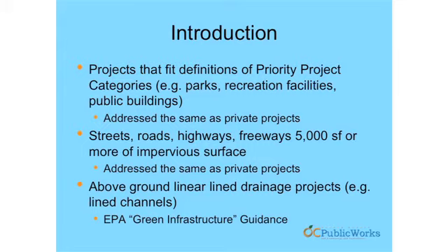Streets, roads, and freeways, at least in the next couple years, are going to be addressed the same as a private project. And after the enrollment in the 2013 permit, redevelopment projects within an existing public right-of-way will be able to follow Green Streets guidance. That will not apply to new roadway projects, but it will apply to redevelopment projects within the right-of-way, which probably relates to almost all of them that a city would do.